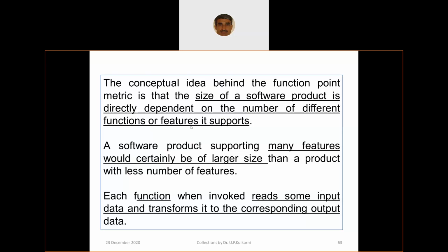Coding efforts, it's a manual related thing. All this experience is put into it: the feature of adding a record needs, okay, 2 man-days and 1 man-day. Usually a programmer's salary per month is this, per day is this, and the 2 days they spend on it, that salary will be the cost of the feature you are adding. That's how the function point gets in.